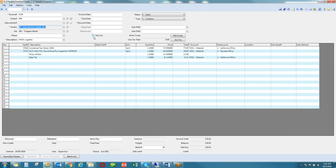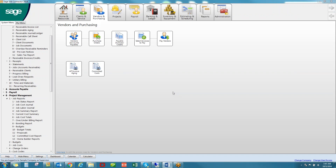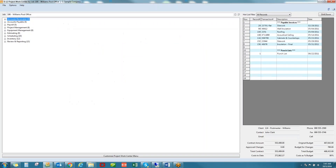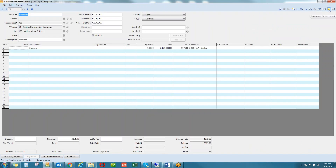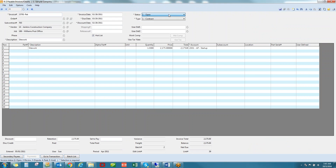The hot list is another feature that allows your team to stay connected. Invoices, costs, commitments, proposals, progress billings, and project documents can be added to the hot list. It appears in the project work center and project hot list screens. From here, a user can — on a job-by-job basis — review all transactions marked for their attention. Once within the record, the user can view and add notes, view and add record attachments, and even change the status of the record. Once they're done with their review, they can uncheck the hot list button to remove the item from the project work center.